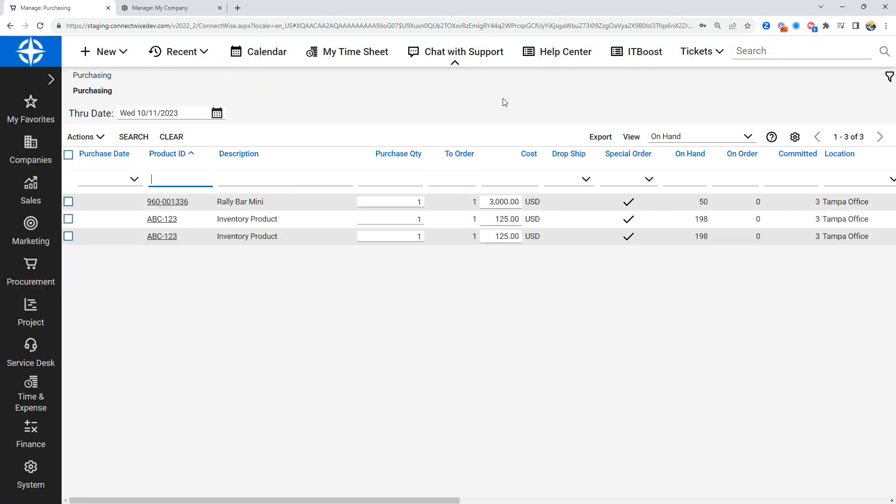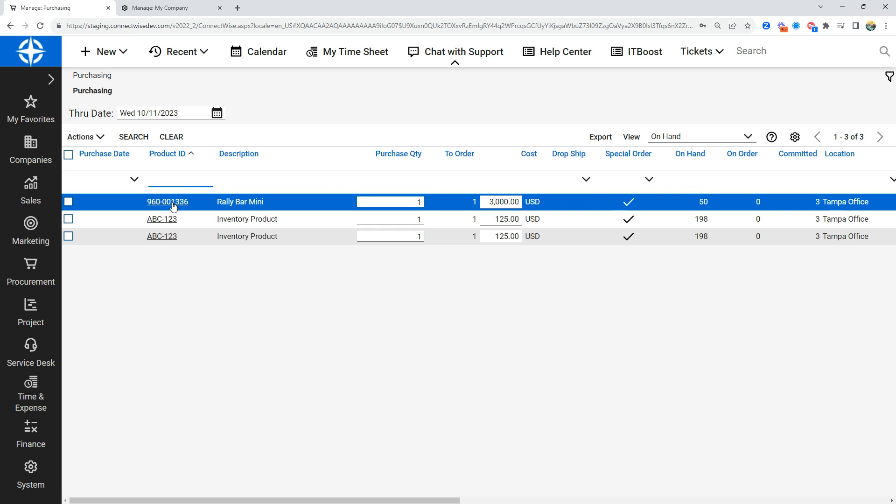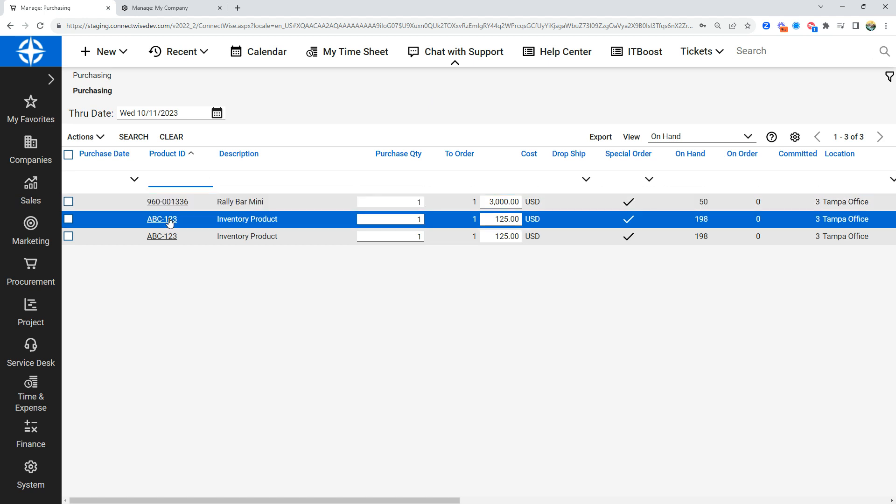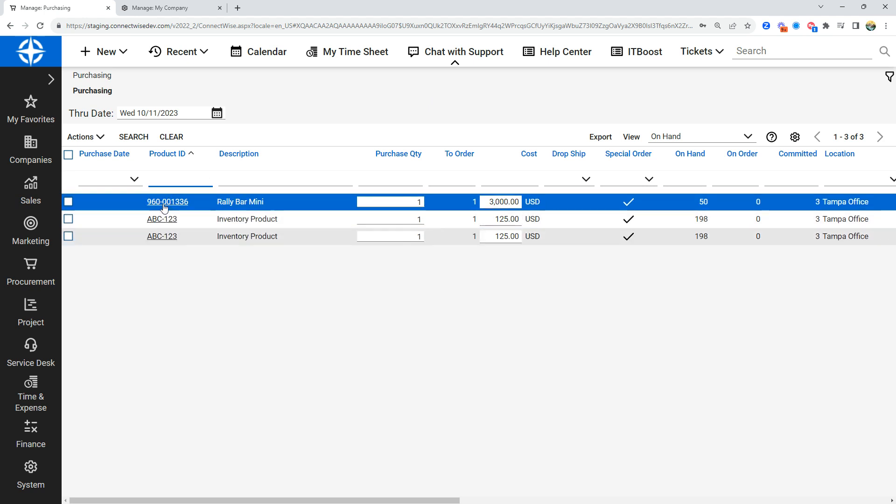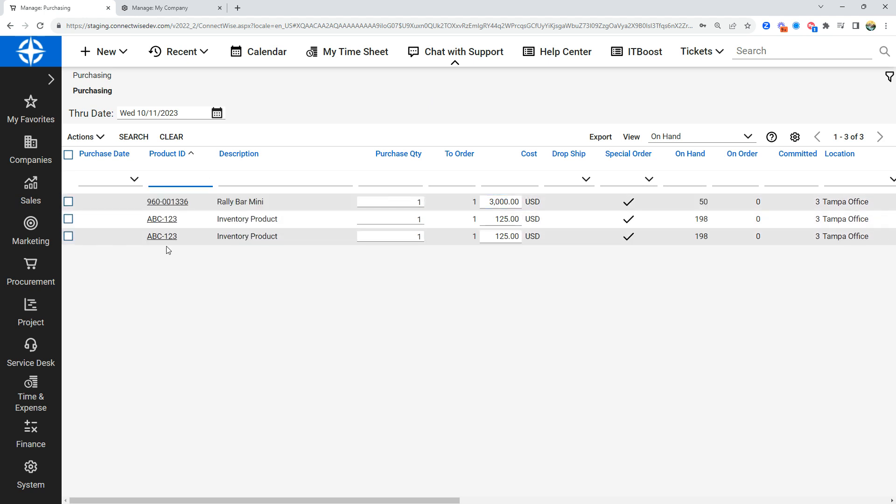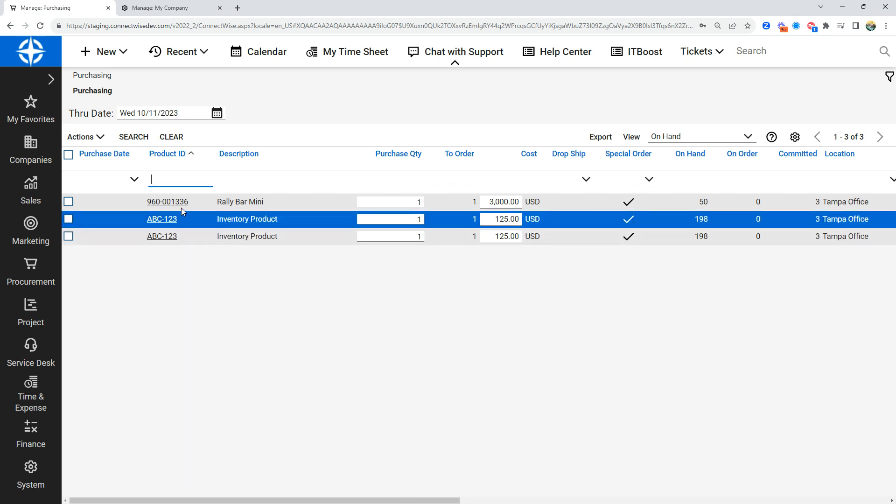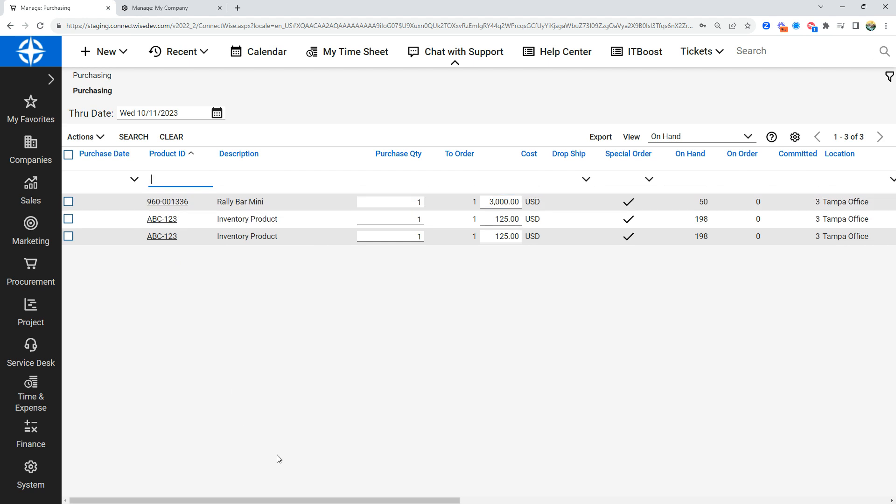Before purchasing, I would go through this on-hand view and find out from the project manager or the technician if these products really are special order or if I could pull from an on-hand stock. If I need to find out where these products are coming from, I'm going to scroll over and find my charge to column.